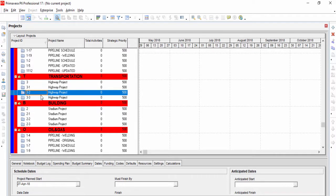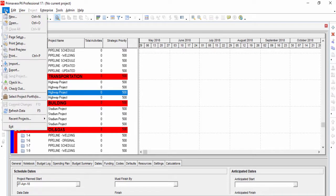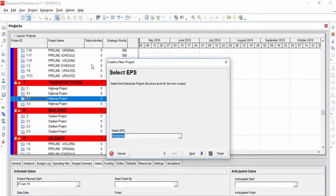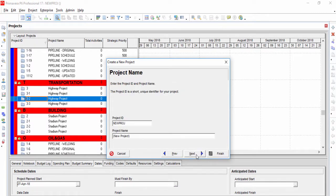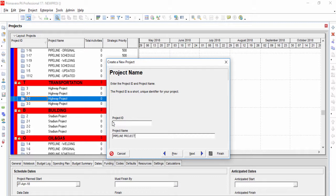First, we will create a new project. This will be level 1. We are typing the project name and code inside the create a new project window.